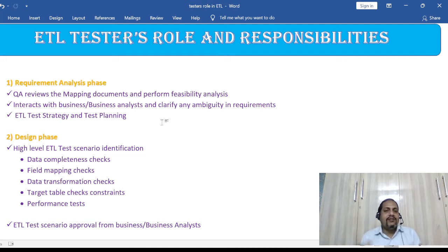What we basically do is, whatever requirement we get, the whole requirement is segregated into multiple sprints. A sprint is basically a cycle of release, right? So a 2-week cycle normally. A sprint is of 2 weeks duration, and then some of the requirements will go into that 2-week cycle.